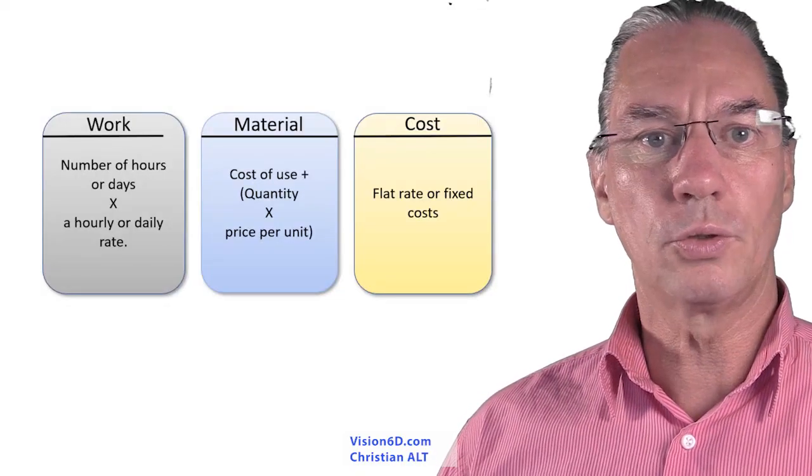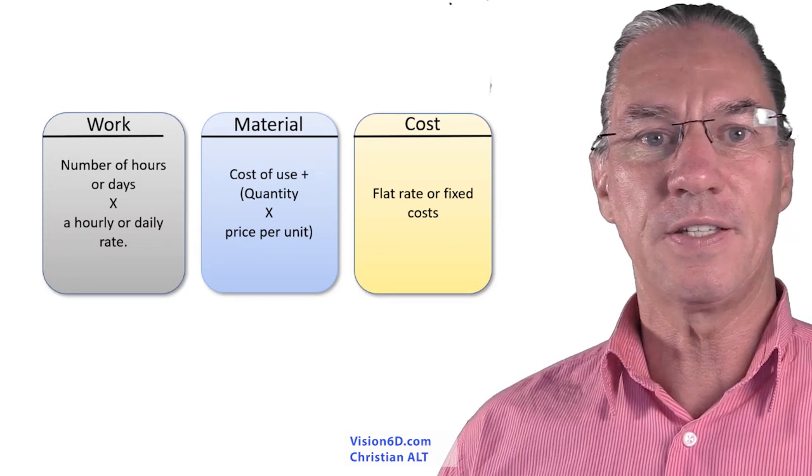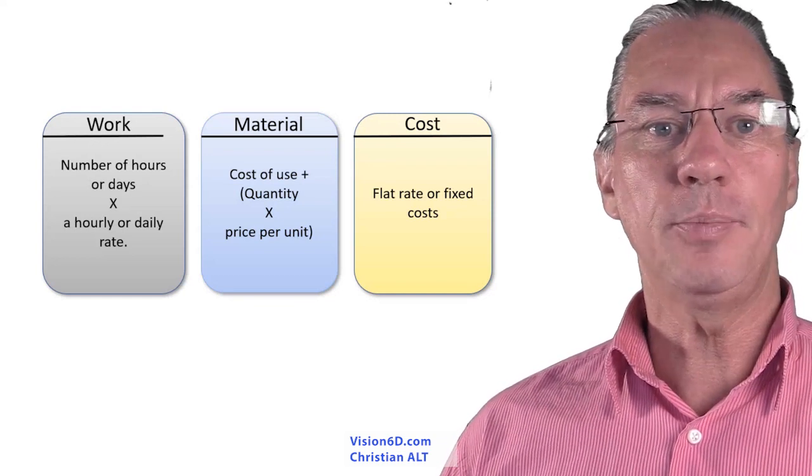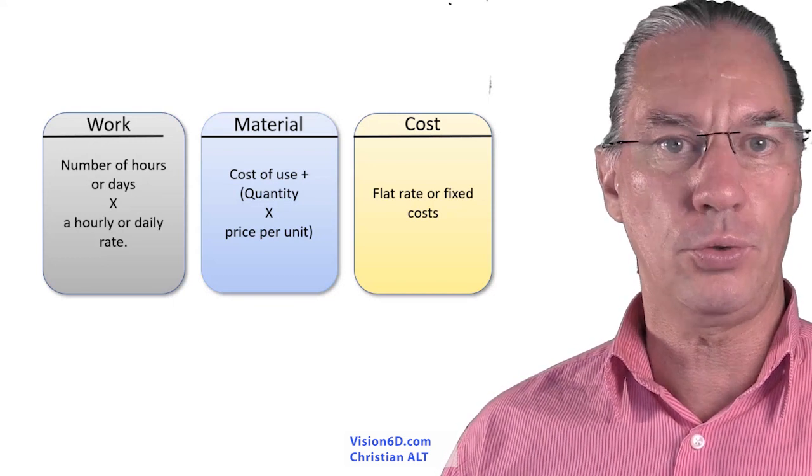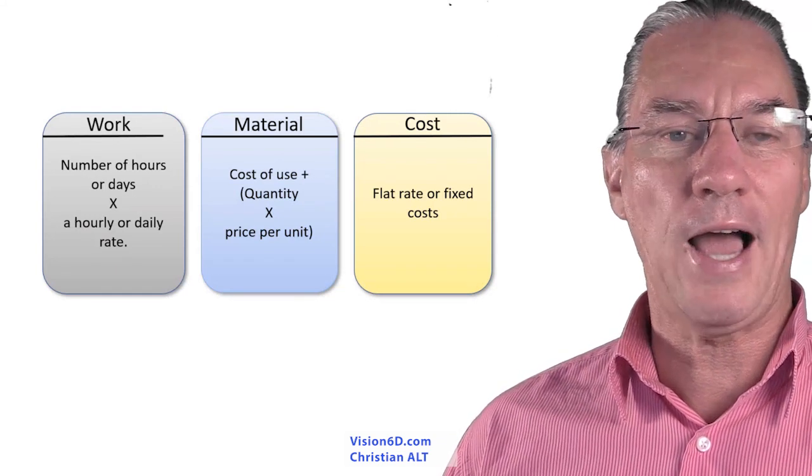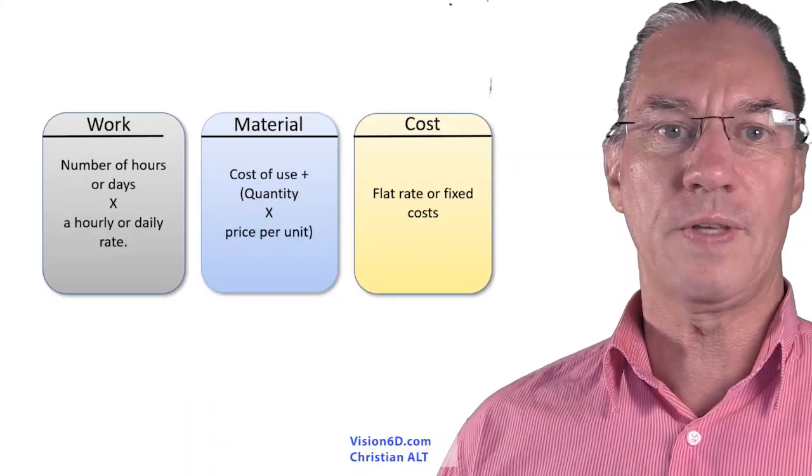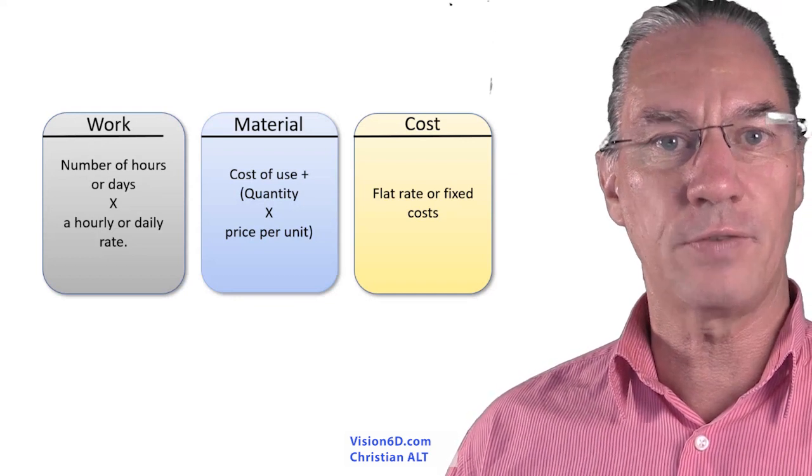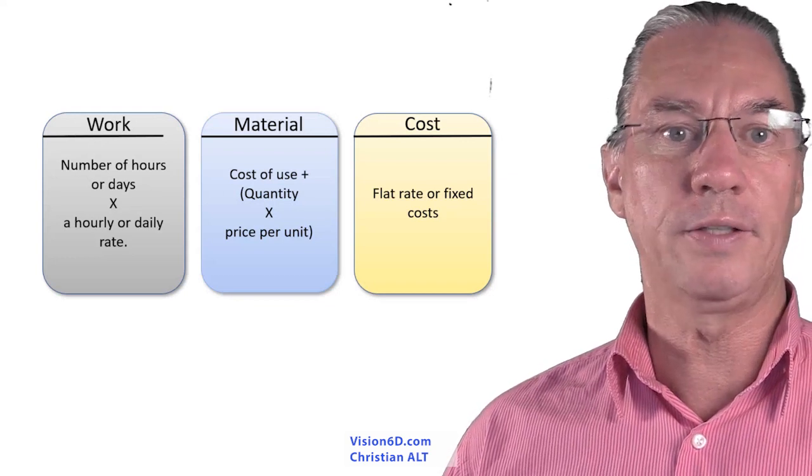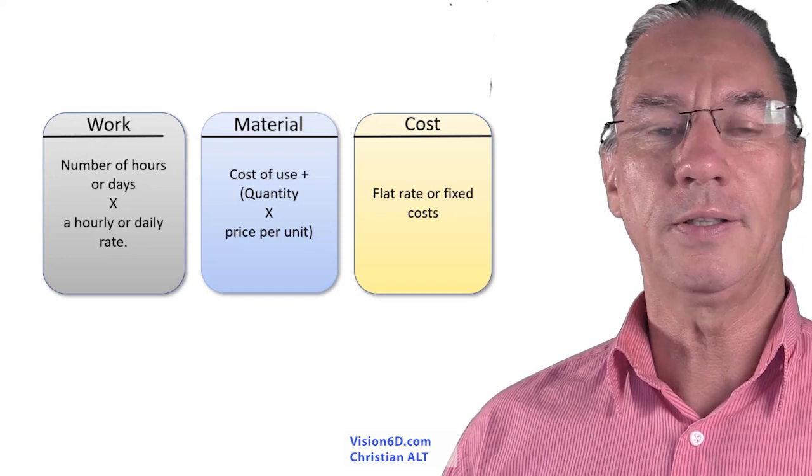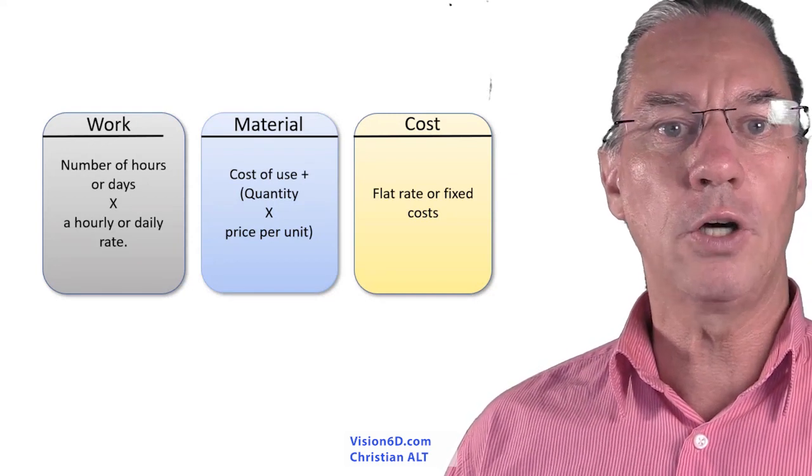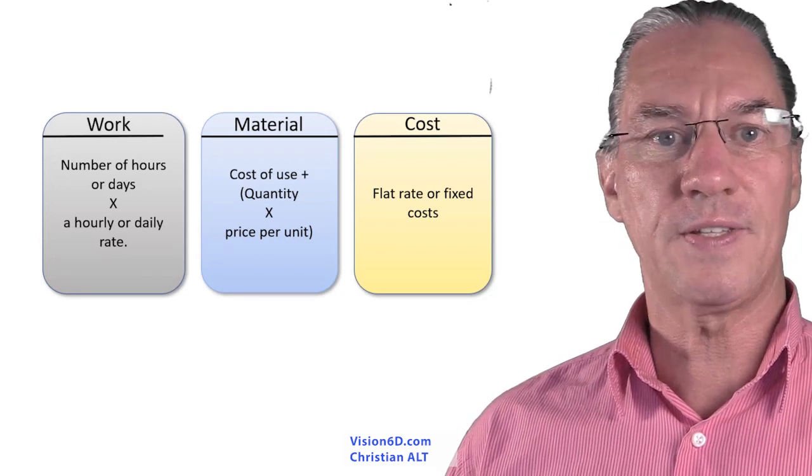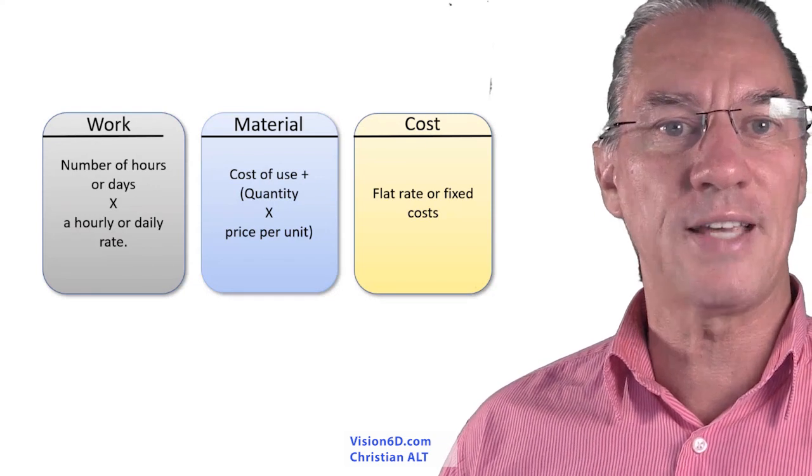For material resources there might also be a cost of use which is added. This is a one-time cost that we add independent of the quantity of material you are going to use. As an example, when I had to dig some part of the earth around my house I needed a crane. The crane was something like 500 euros a day, so I used this crane for several days. But they also told me that to bring the crane there was a flat rate of 100 euros. So this is a single cost of use. So I had those 100 plus three days of 500, which made 1600 in all.